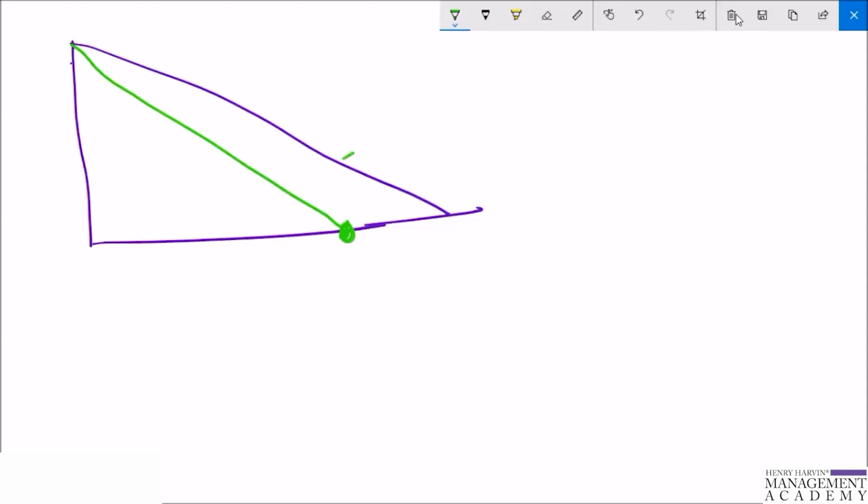So the team finishes its work sooner than expected. The stories were implemented, but the team didn't work on additional stories, even though it had the capacity to do it. And the stories are probably overestimated because the team finished them earlier. Also, the velocity of the team has not been estimated correctly. So the Scrum Master must be proactive in either getting the team to flex estimation or ensuring additional stories are ready to be added within the sprint.